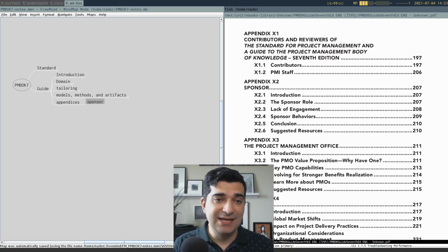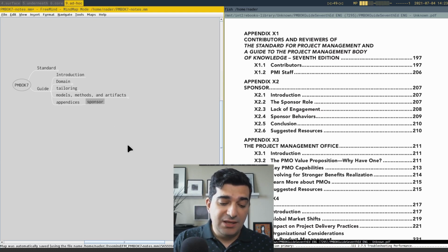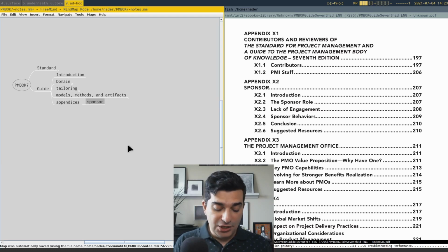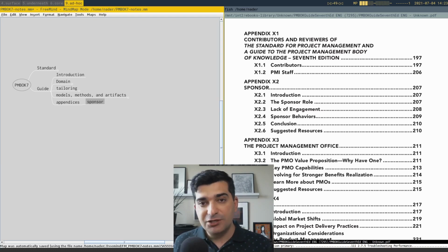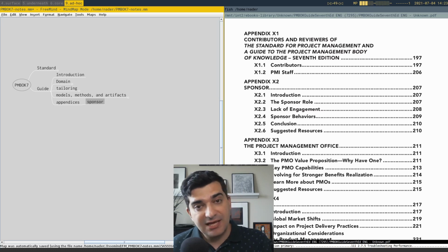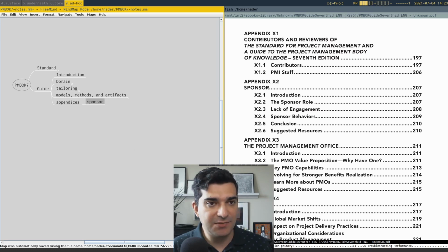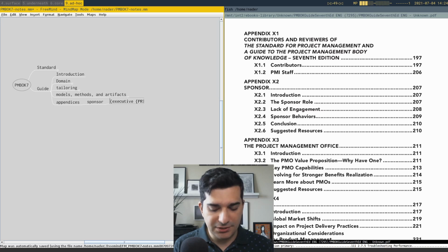And on the other hand, it's not practical to expect a single person, such as a project manager, to spend a lot of time with the concrete aspects of the project, with the day-to-day aspects, with the details, and also pay attention to the high-level aspects. And therefore, it's a good idea to separate those two and have two different roles. Now, this concept is called executive in Prince2. Let me write it like this.